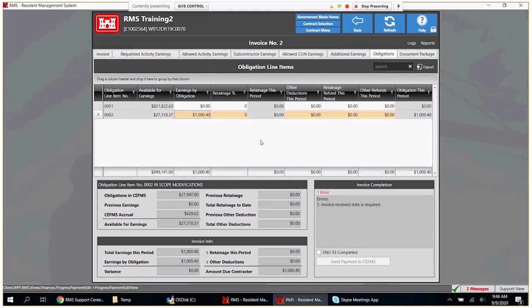that the contract defines that you are going to retain a certain dollar amount, and let's say it's for as-built. Sometimes you have a percentage that is defined in your contract, and sometimes you have a dollar value. So let's just say that your contract requires that we are going to withhold $50 until such time that we have as-built. And that's not necessarily considered retainage. That is considered an other reduction this period.